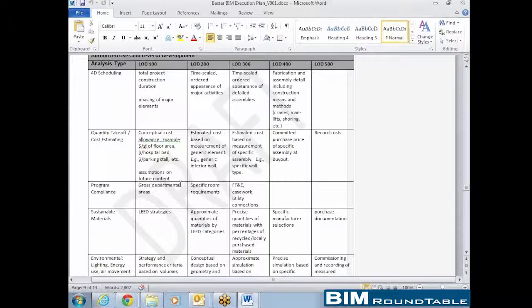It was a combination of the fact that the model was missing the weight parameter. But even when I went back in and corrected that and added a weight parameter, what anybody was telling me was still 50% off. Well, it should have been. Okay, so there's a glitch in it. But we can still pull a lot of good numbers from things like interior envelopes, curtain wall, things like that. We get really good, precise quantities. So it's the combination of two things, the model and then whatever software you're using.